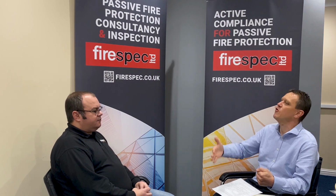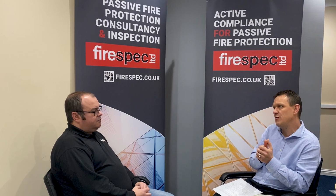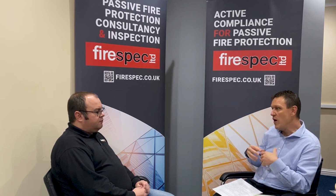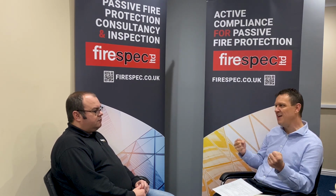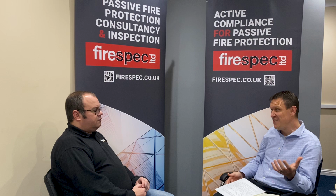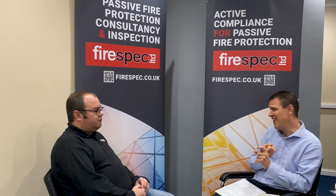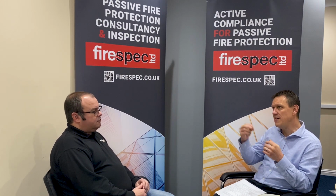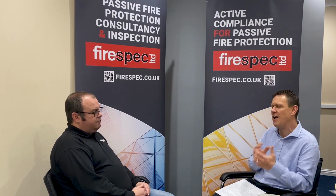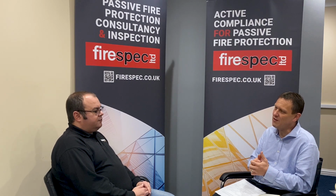So we stepped back a bit and tried to help them from an earlier stage. What we're finding, particularly with tier 2 contractors down, but some tier 1 contractors as well, is a lack of appreciation of that early engagement. Take the golden rules in the design and installation of fire stopping guide. Take that guide, and rule number 1. What's rule number 1? Early engagement. I think the message still has to get through, and again, it may take a number of years yet before it's throughout the industry. But you cannot say enough how vital early engagement is to compliance.